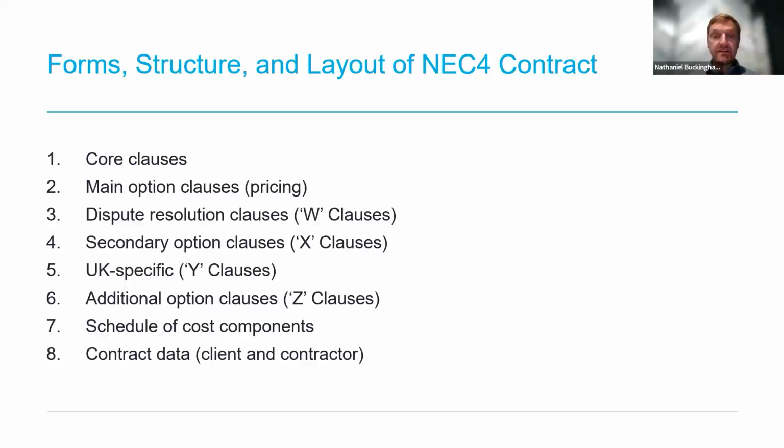Now, we see these Z clauses ranging from reasonable required amendments to reflect specific circumstances of a project to wholesale amendments that really cut through and change the philosophy of the underlying NEC4 contract. So the Z clauses give full flexibility to essentially do what you like with the NEC contracts.